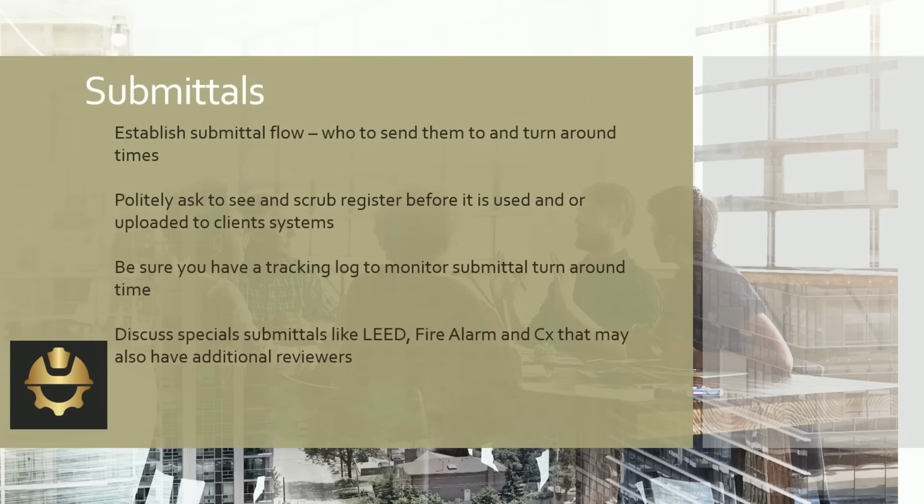Yeah, the big one here, ladies and gentlemen, is the fire alarm and the emergency life safety systems. You've got a dedicated design on that, so your fire alarm contractor, your security contractor, your fire suppression contractor, they come up with the design, right? And then you've got to pass that along. You've got to document that you've sent that to the designer. But you also have to send it to the fire department, like Renee was saying.